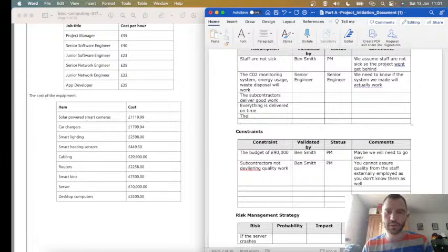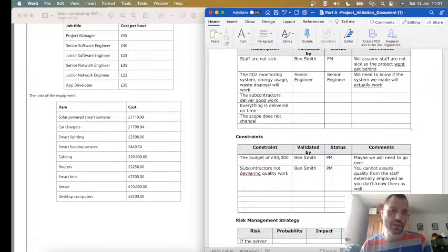We're assuming that the scope does not change. Yeah, that Imran's not going to come in with something new because you forgot, as clients like to do sometimes, and you just have to sort of say, no, we can't do that right now. We can do that when we've got time to do it, or build that into another sprint so we can cost that in. Yeah, make sure you fill out all the other boxes.